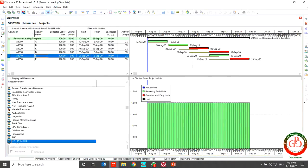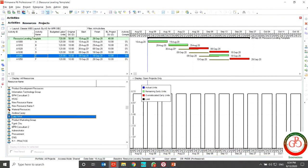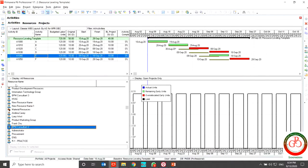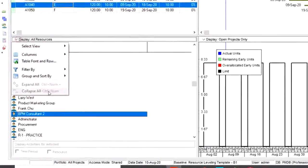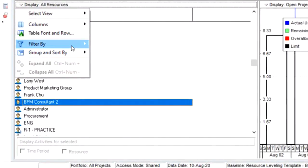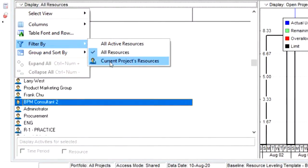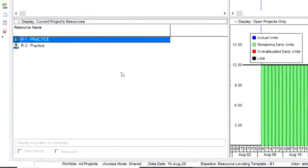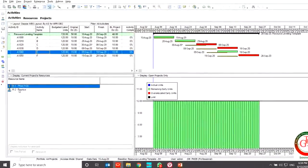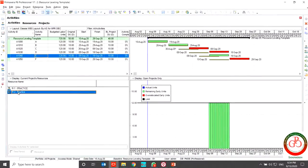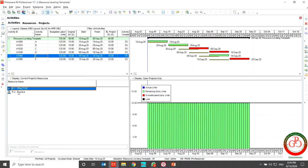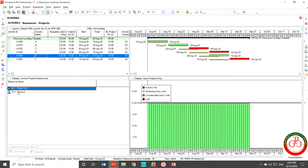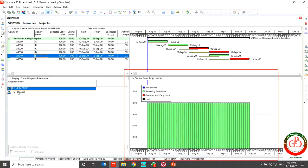But if you want to have a look only on your project resource, you can use current project resource filter. If you use this filter the software only shows you the active resource in your project. And as you see my resource overallocation is resolved.